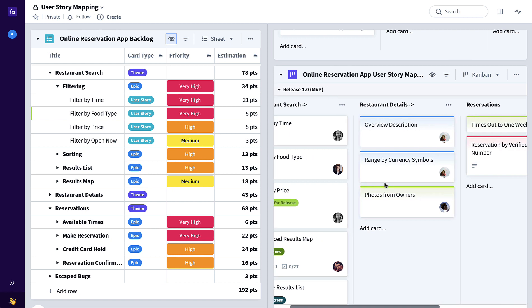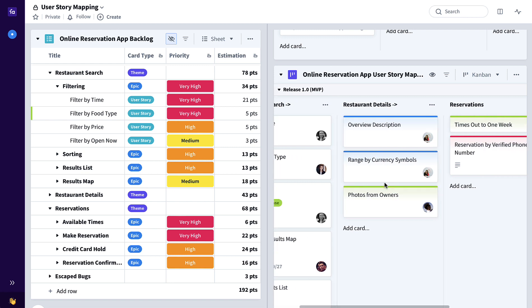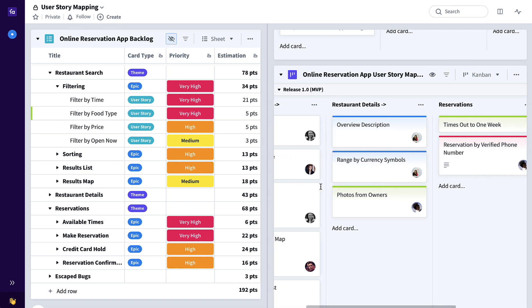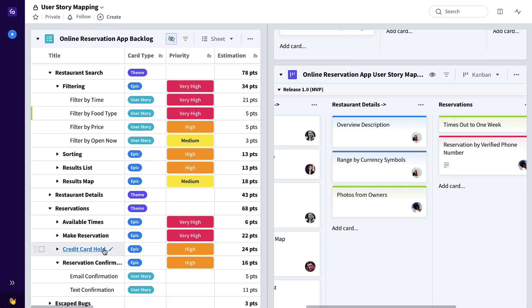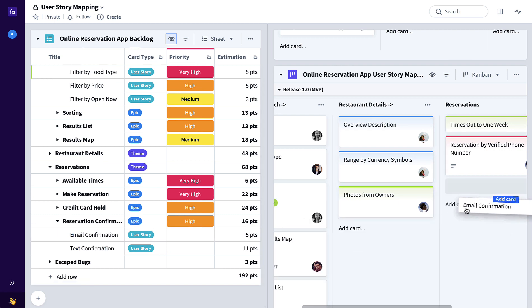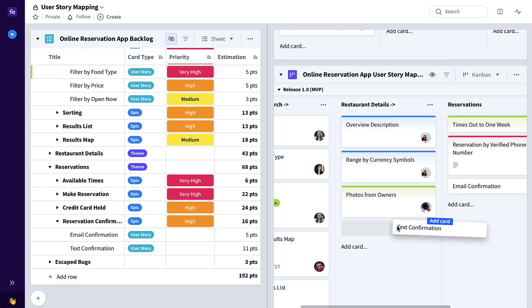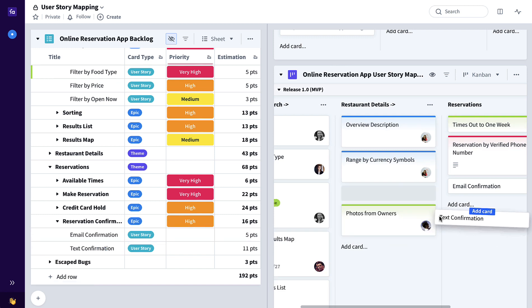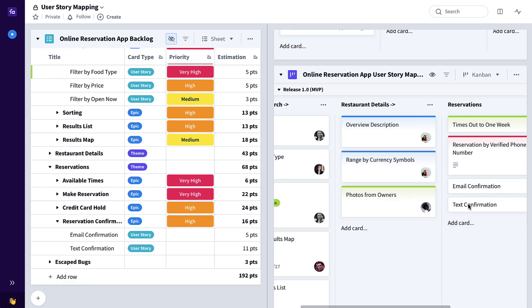For reservations, let's flesh this out a little bit more. We'll open up this reservation confirmation over here in the backlog to expand it to the user story level and drag and drop just as we did with the epics. Maybe we want to prioritize text confirmation over email confirmation, it's as simple as dragging and dropping it above email confirmation like this.